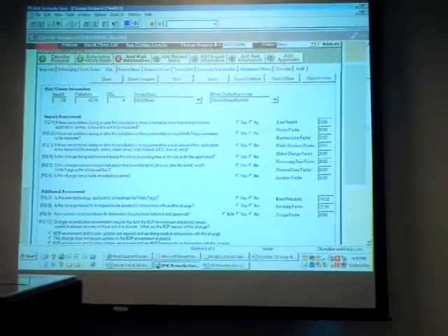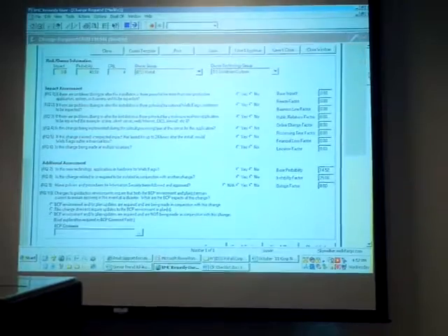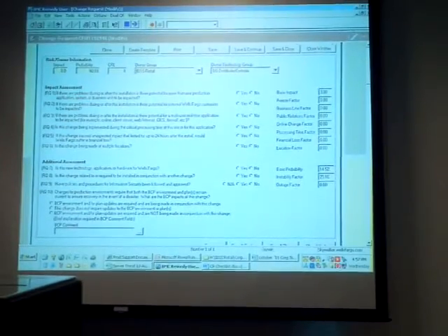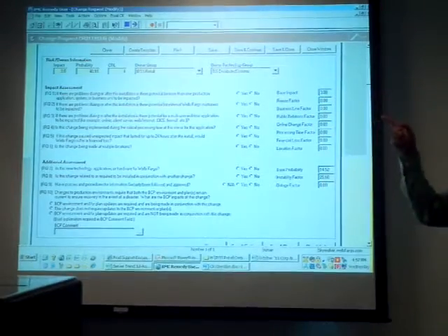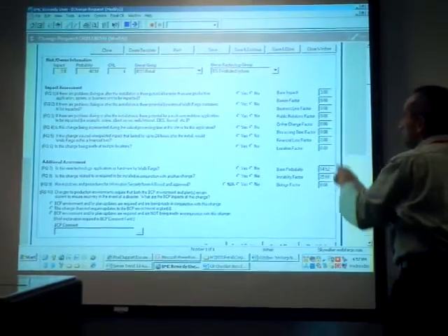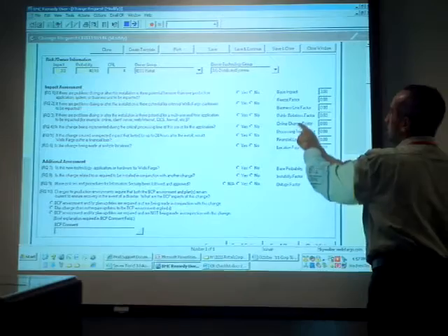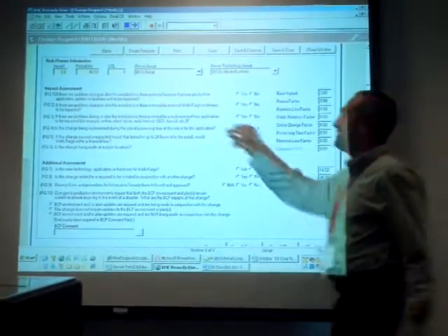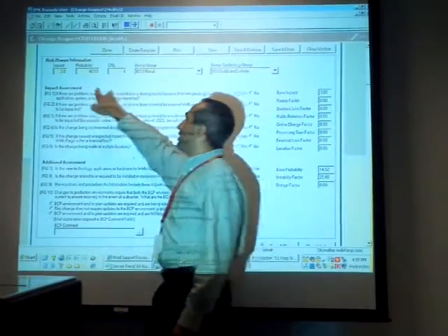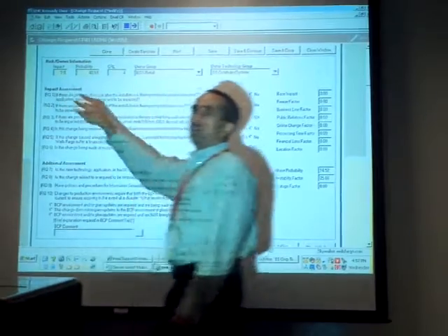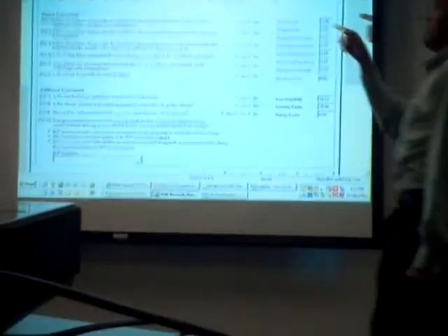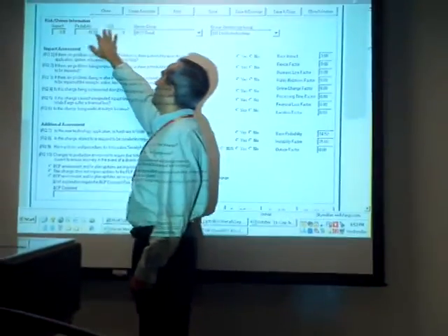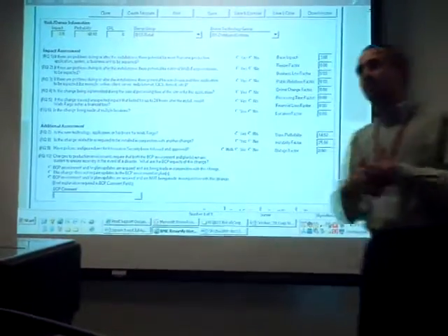When you click on next, this is where you essentially do your risk calculation. There's something called an impact. There's something called probability. Probability is a sum of all these numbers, these factors, and they make up the probability. The CRL is calculated based off the product of these two; there is a range. So if it's 0 to 50, this becomes a CRL 5. So it really depends on a few factors.